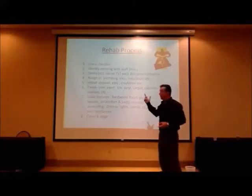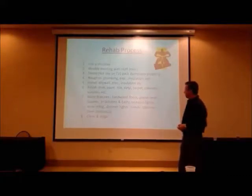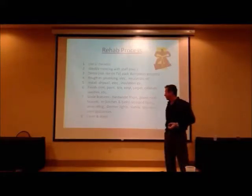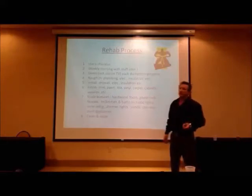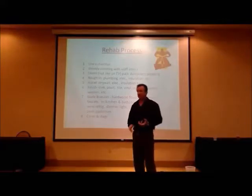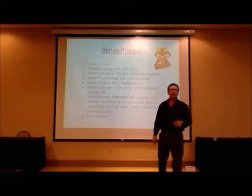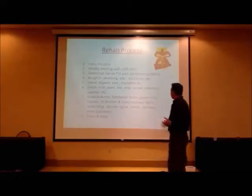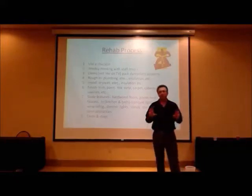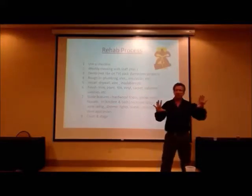Next step is your rough end. You're gonna have the plumber, the electrician, insulation. Then you're gonna go to painting, vinyl, putting the cabinets in, trim. Sizzle features, everybody loves sizzle features, right? That is your skylights, your granite, your tile, your wine cooler refrigerators, which are extremely popular today. Dimmer lights, we are big on dimmer lights, especially if you're showing the property and you have certain lights dim that hit the granite and then it just pops.